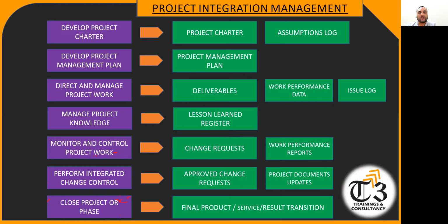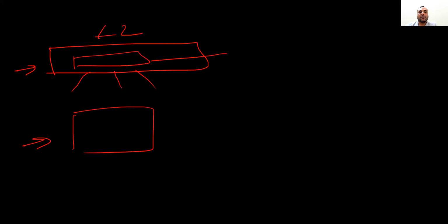And the procedure of closing the project is what? You will have a post-project meeting where you can do the post-mortem of the project for lessons learned purposes. What went wrong, how we did it, how we should continue in the next project, and so on. Then you will take the feedback of the customer, what their impression of the project was and how satisfied they are with the project. So this is called a performance report.